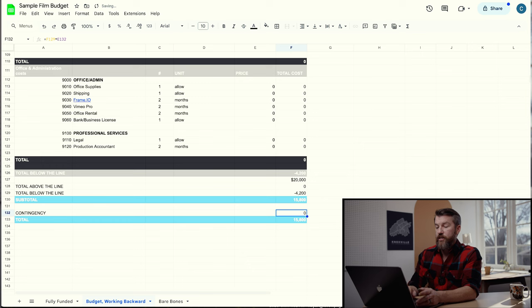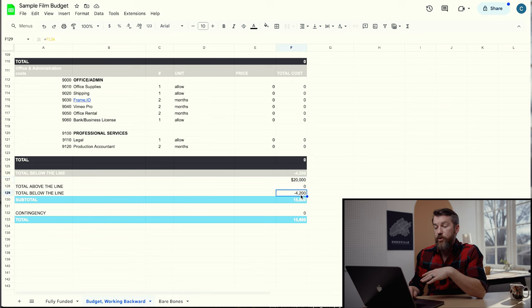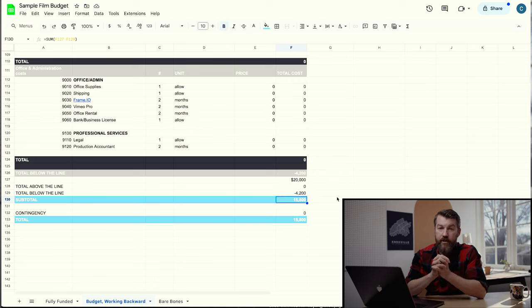We're not going to have a contingency for this one. So working backwards starting with $20,000, after hiring a producer, a gaffer, a colorist, and a sound designer, my total spend is negative $4,200, which means that I — as the director, DP, and editor — would make $15,800 off this project. That's a pretty good payday, and it shows how you can use this method to figure out what you could potentially make as a production company when you have a set budget.